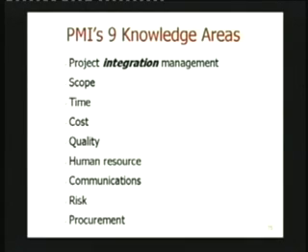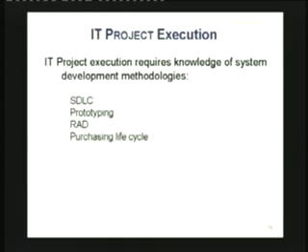Risk, I just can't tell you how important this risk business is, because there is almost no project that goes along just exactly the way you plan. There are things that foul up here and there. And procurement, what things you'll make in-house and what things you'll be basically buying from outside. These decisions have to be made. These are in the PMBOK guideline, the practitioner's guideline, they call this 9 project areas, 9 project knowledge areas.